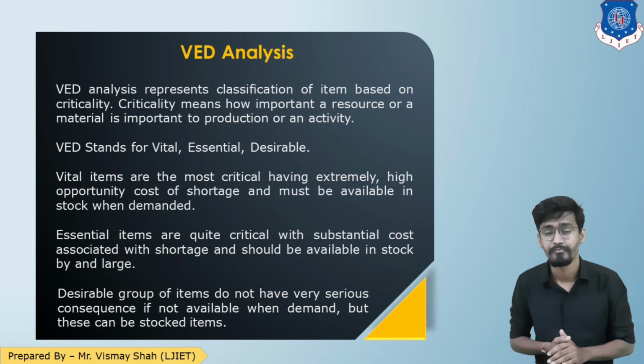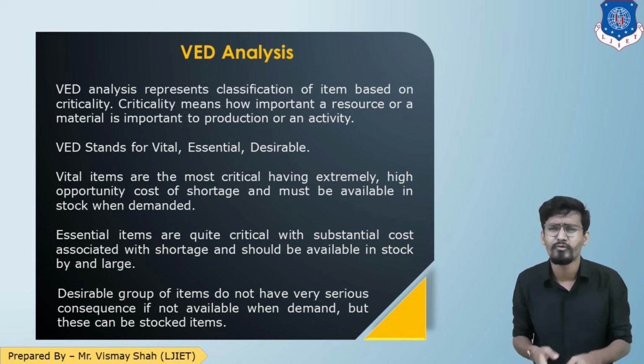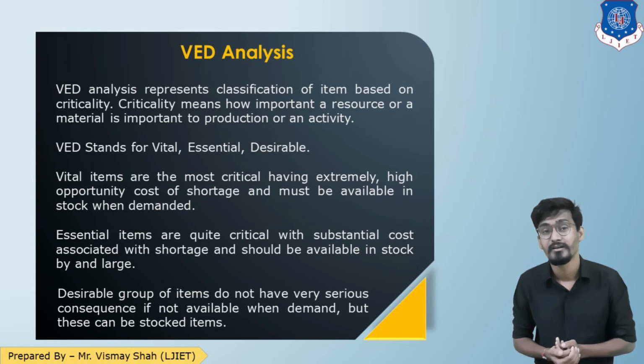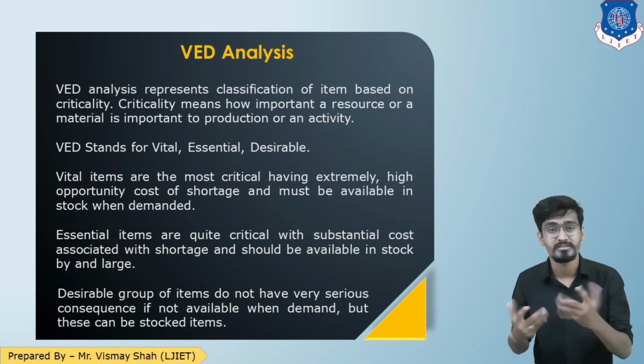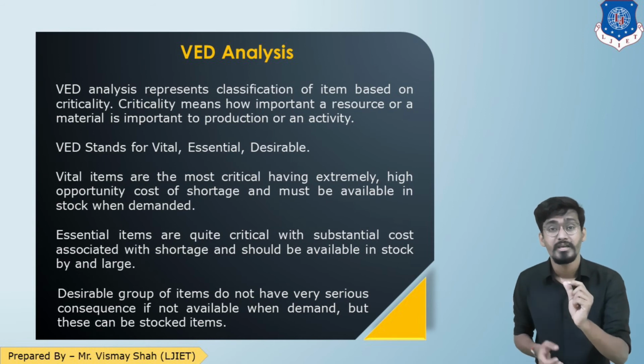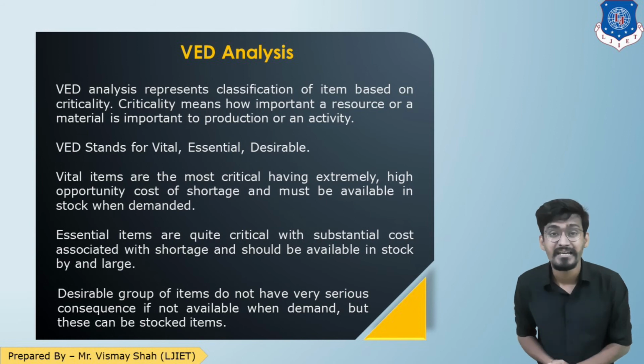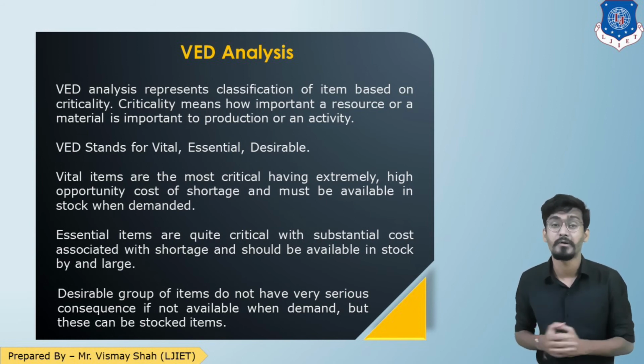And this can literally happen, that there are all the huge formwork materials. There are plywood and firmas and tekas and couplock system, jack system available, but the nails and the binding wire are not there. So what will your subcontractor do? Your subcontractor will stop the work immediately, because without them the work cannot happen. So criticality: the material is very low in terms of cost, but its criticality is very important. So that is how VED works.